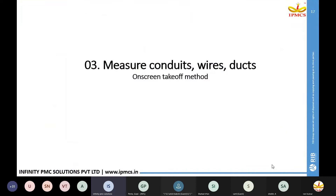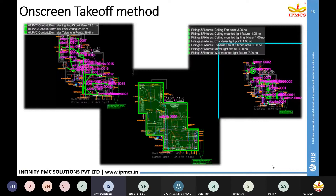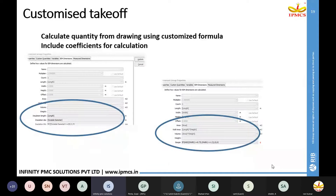Next, we are going to see how the on-screen takeoff method is helpful for measuring conduits, wires and ducts. We are also going to see how to use customized formulas for quantity takeoff and how to include coefficients. For example, if you are measuring a duct, each duct with different gauges will have a different unit weight. We will see how to apply unit weights for different types of gauges and ducts.